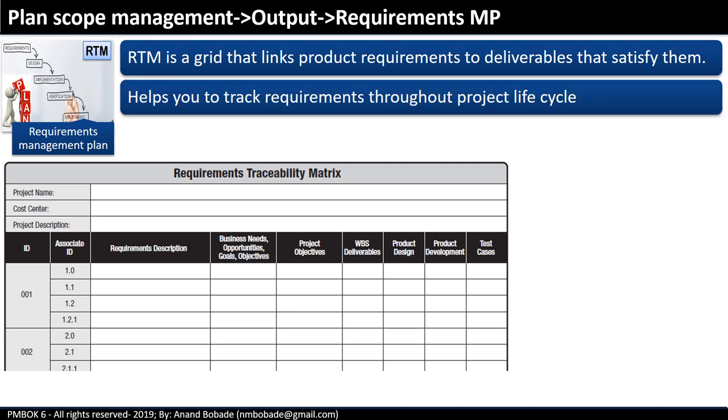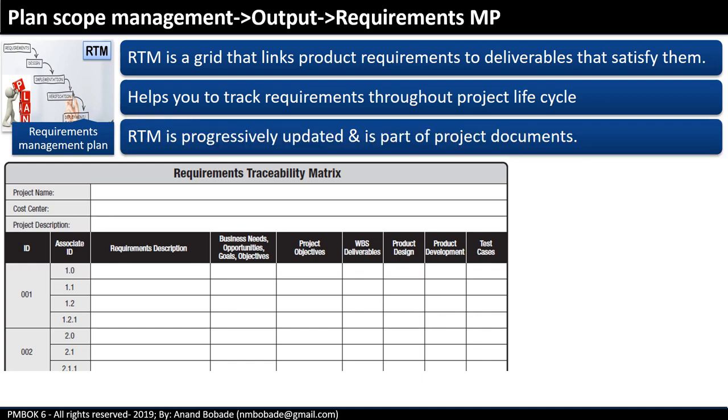RTM helps you as a project manager as well as a business analyst to track requirements throughout the project lifecycle. RTM is progressively updated and is a part of the project documents. For example, when the product is designed, requirements will be linked to the design elements, or RTM will be updated marking requirements that are already considered in the design.